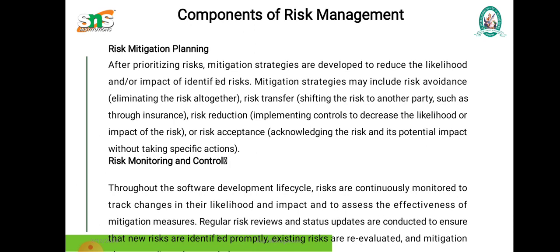Next component is risk mitigation planning. After prioritizing risks, mitigation strategies are developed to reduce the likelihood or impact of identified risks. Mitigation strategies may include risk avoidance, risk transfer, risk reduction, or risk acceptance.